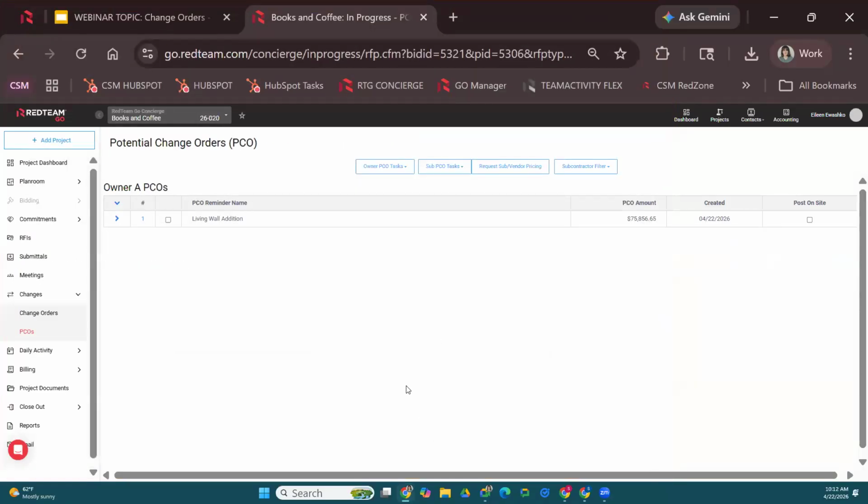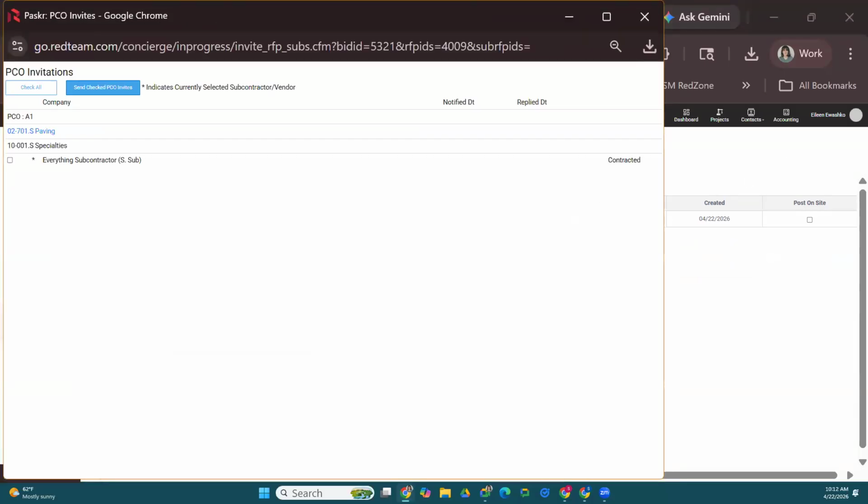All right. So now if we are ready to send out the request for pricing, we are going to check the PCO, and then we are going to go to request sub-vendor pricing. We're going to get our pop-up. Red Team's going to ask, who do you want to invite? Obviously, I want to invite everything subcontractor, and then I'm going to select send checked PCO invites.